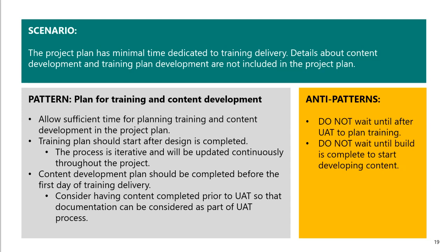Your training plan design should start after the design of your solution is completed. So after you've got all of those requirements in place, you should have all of the basic information that you need to start your plan. But remember, it's iterative, so it's going to be constantly tweaking and changing as the solution comes along. Your content development plan should be completed before the first day of training delivery. And I recommend having a lot of that in place prior to UAT so that your documentation can be considered as a part of your UAT process.